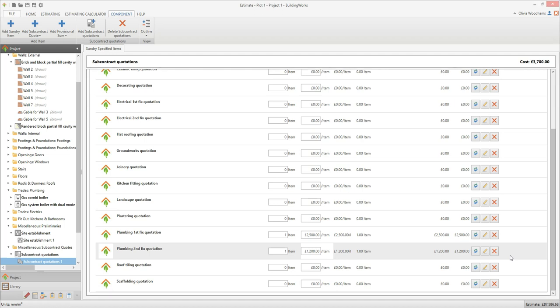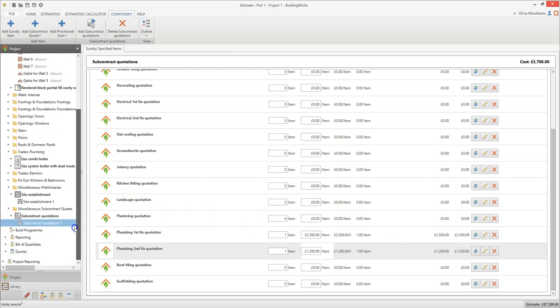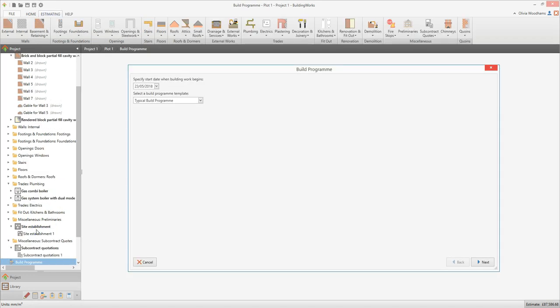Now let's take a look at the Gantt chart, or build program as it's called in BuildingWorks. What's really clever about the build program is that although you can use it standalone to manage the job, the chart is actually linked to all the materials and labours specified in BuildingWorks, so BuildingWorks can produce time-based reports such as cash flow or profit forecasts, or just-in-time material and labour schedules. Click on the build program on the project explorer. The first time you navigate to it you'll need to create the build program by entering a few details.